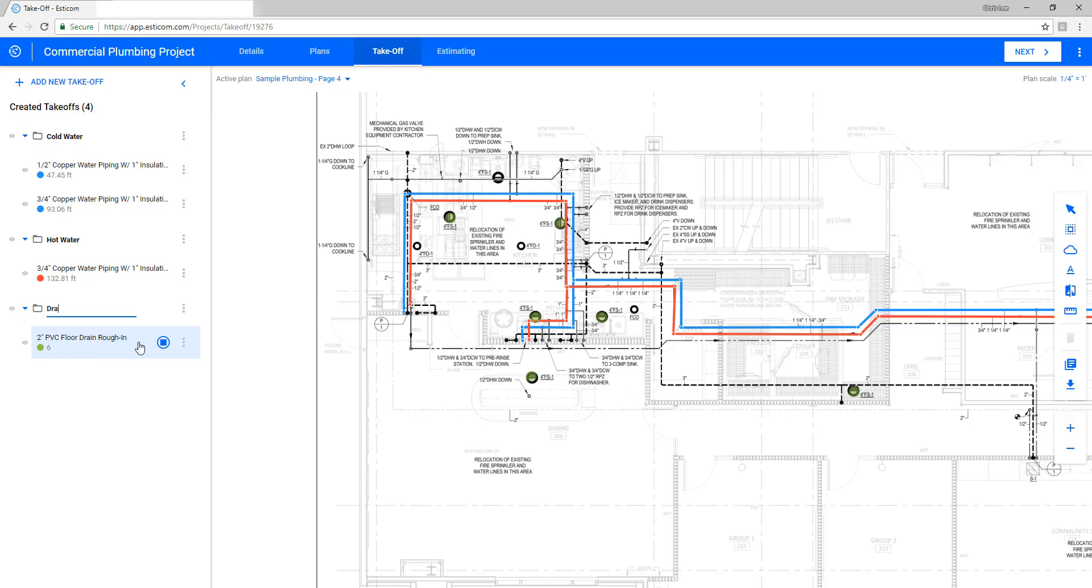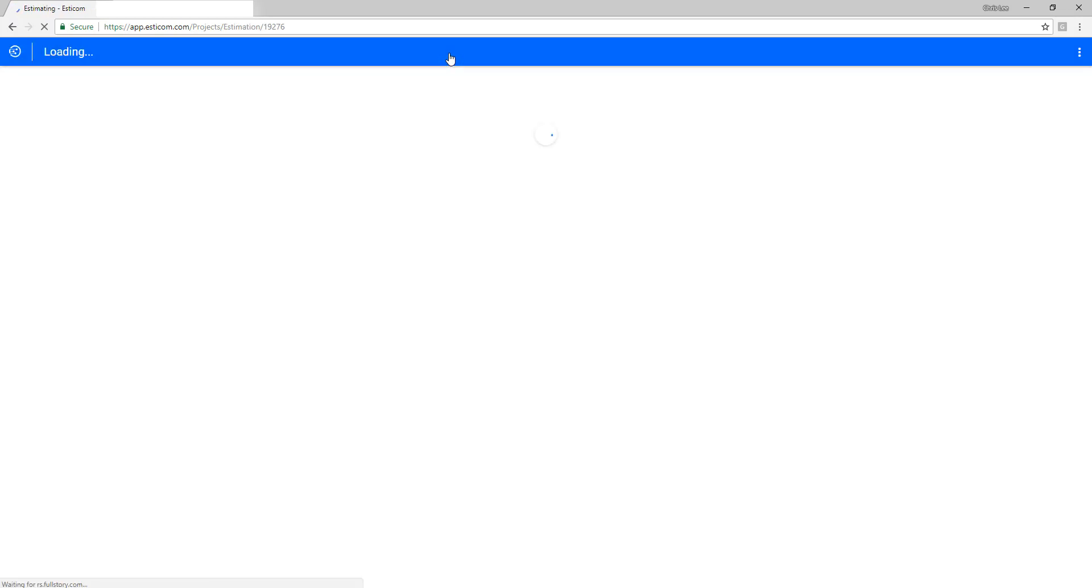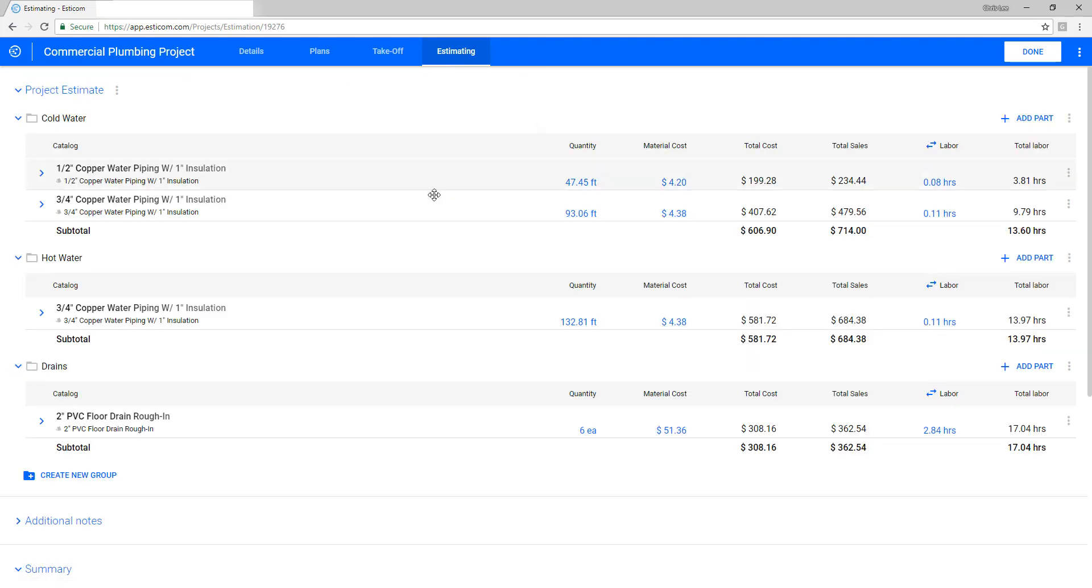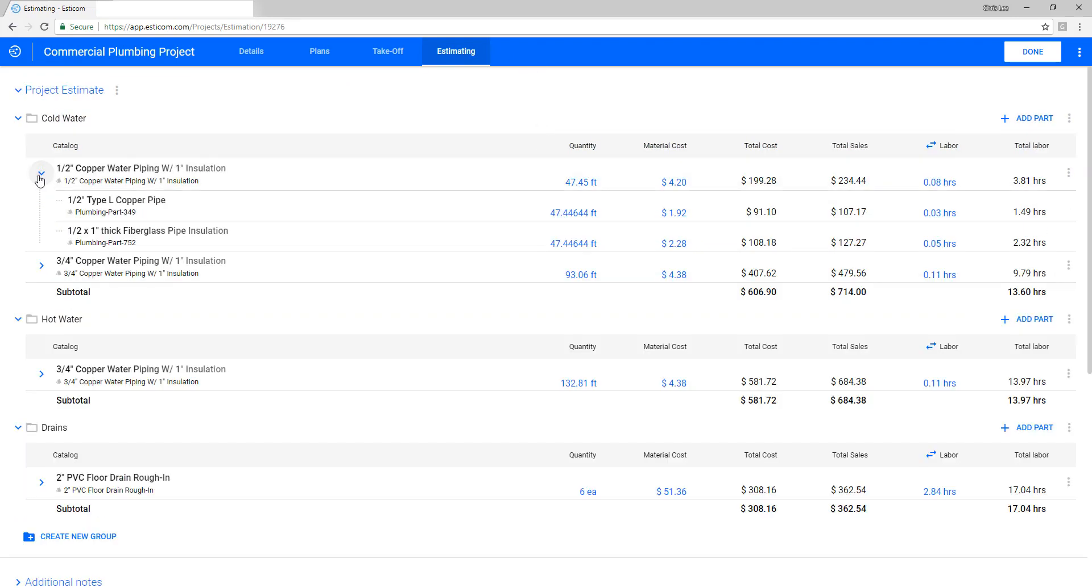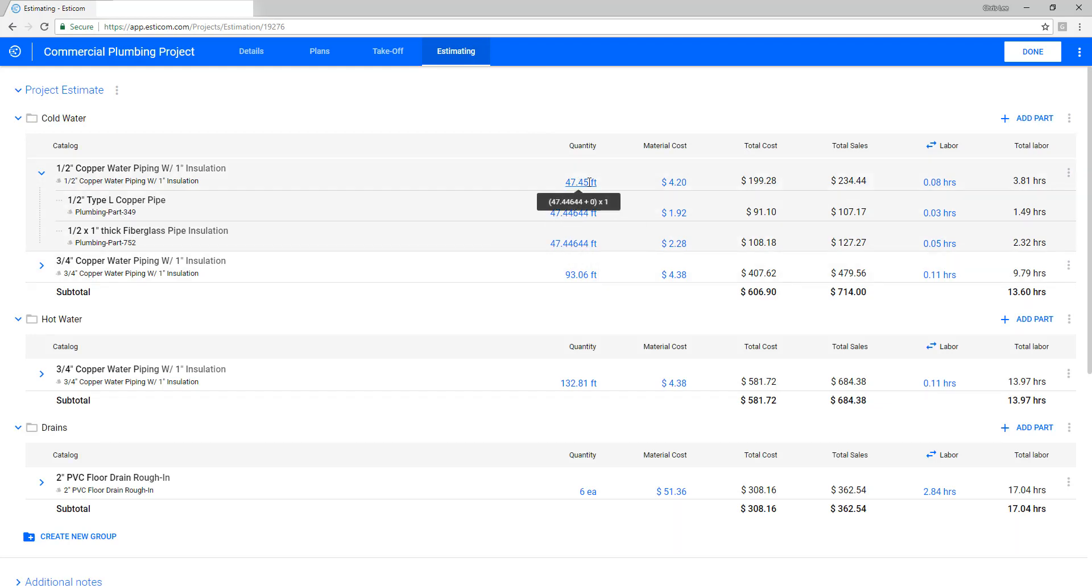Now let's rename the default phase appropriately and move to the estimating portion of the application by clicking the estimating tab. Here you'll see your takeoff quantities and you can expand the assemblies to see the underlying parts and quantity ratios, labor and material cost, and you can make adjustments where appropriate.